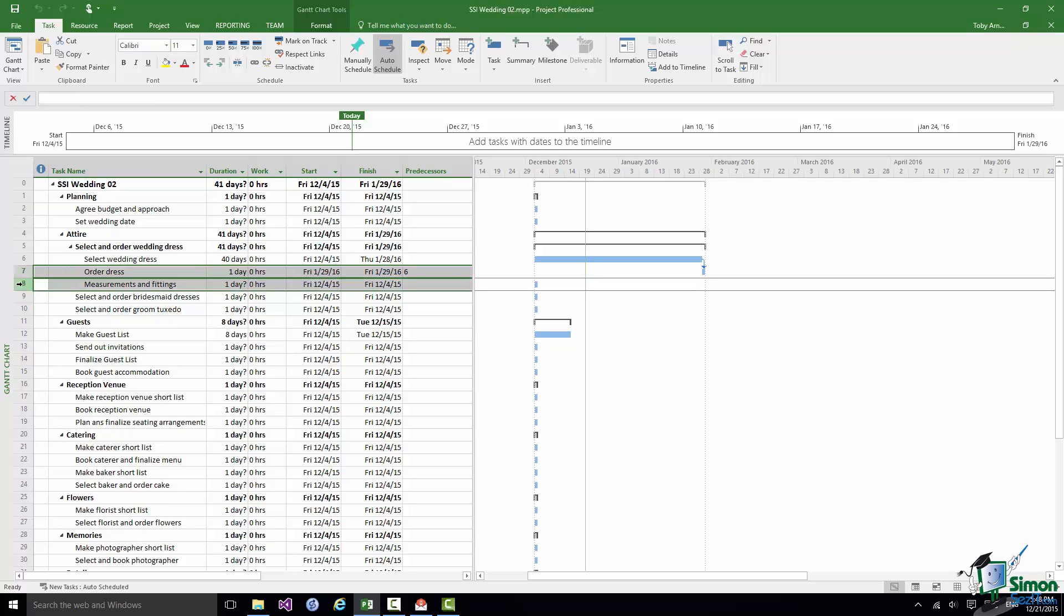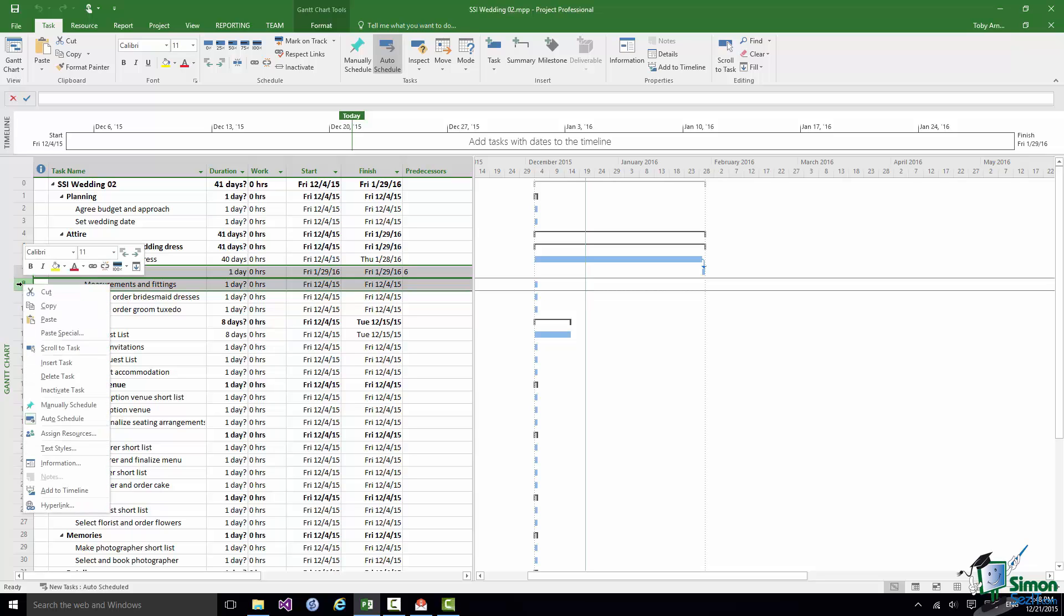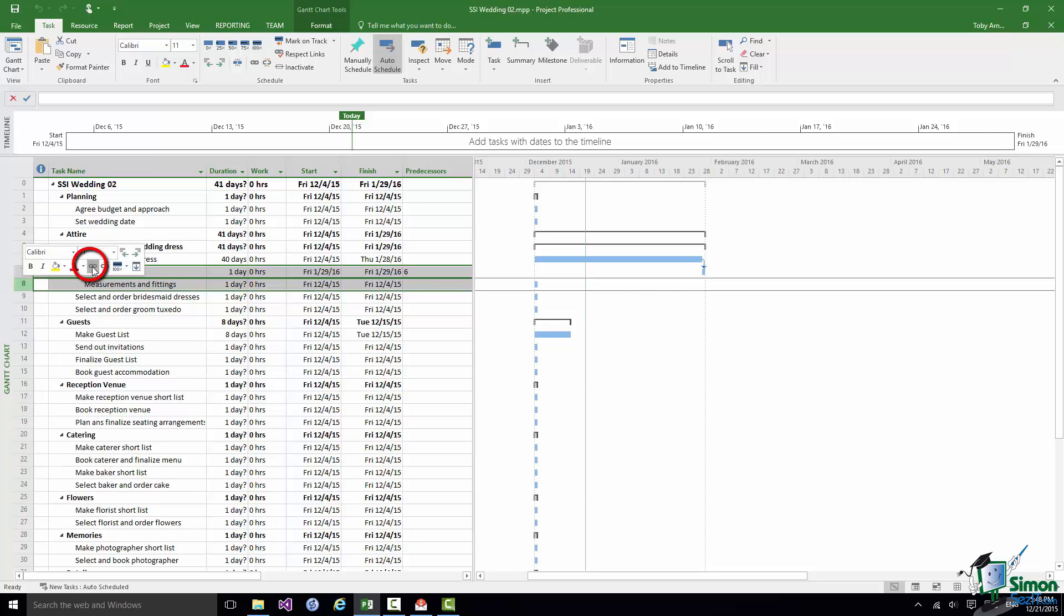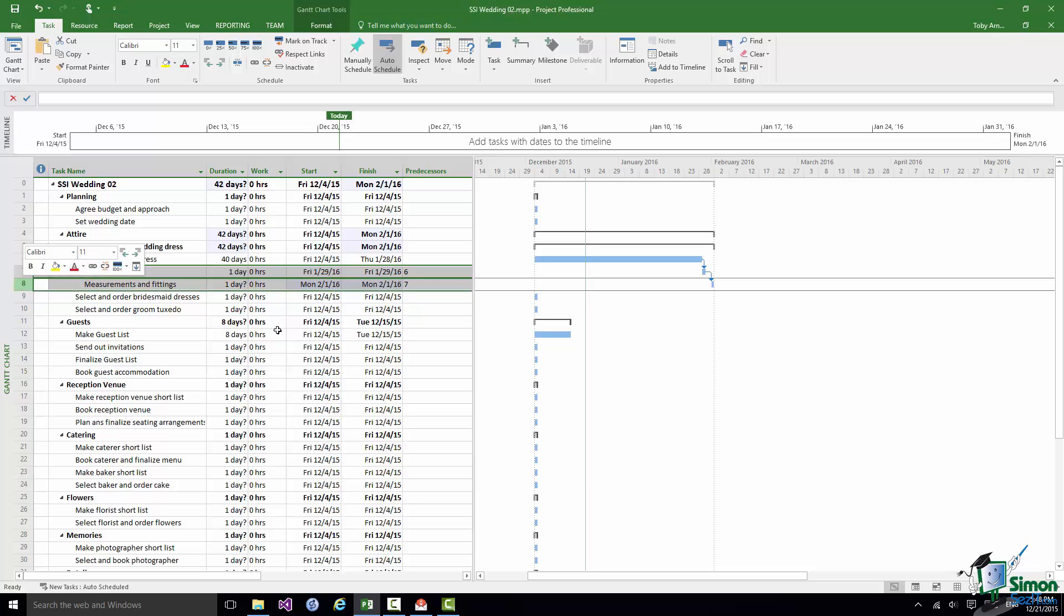We could create a dependency in exactly the way that we did before. If I right click on the selection, if you look in the Mini Toolbar there's a Link button there so I can do the link that way. And I can do the link before I establish the second duration.